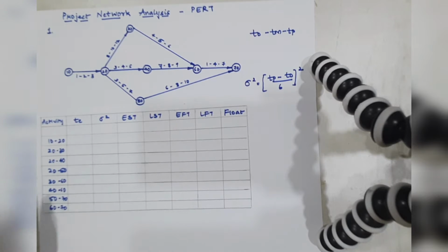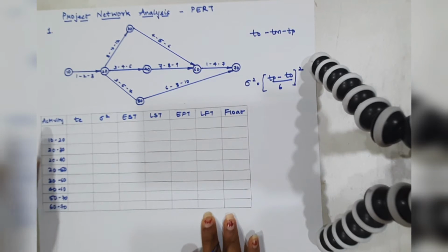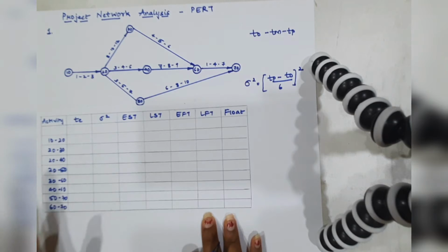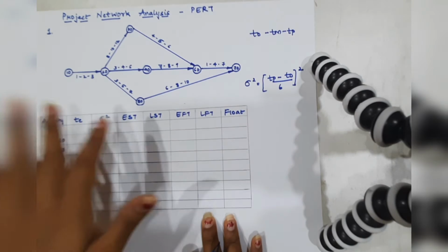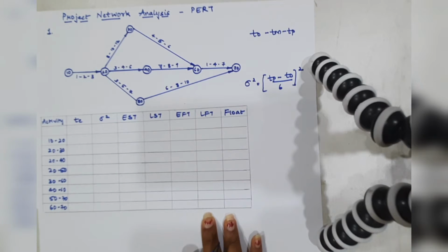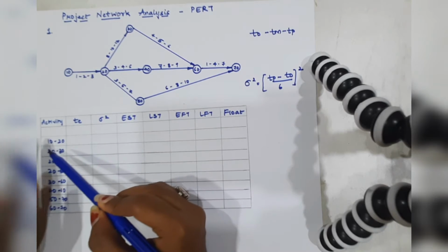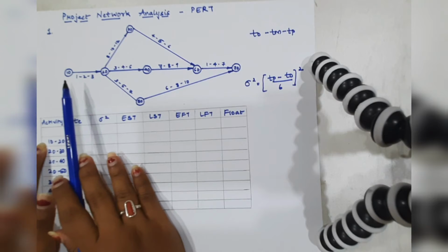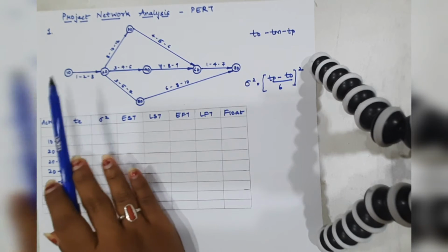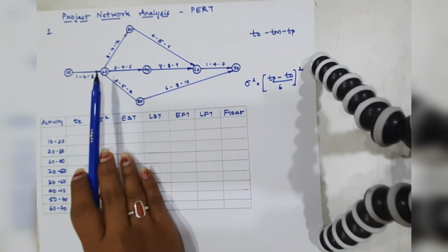One thing we need to consider while writing the activities is that we need to follow an ascending order sequence. First we see 10 to 20, then for 20 we see what other activities are connected to it, and in that way we follow it. As soon as we are done with 10, first we look over 10 to see if there is anything else associated with 10. If not, then move on to 20.